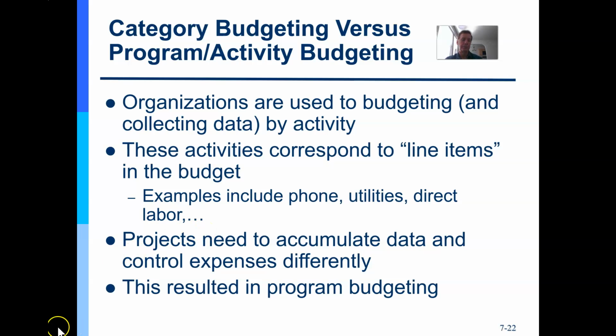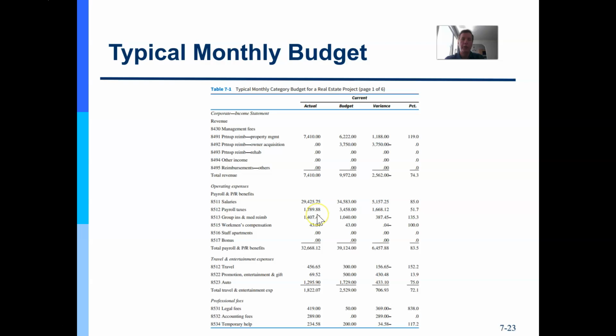Okay, so now one of the things that's going to help you with your budgeting approach is to break out line items. So if you have to eliminate something, you know exactly what it is, or add something in. And a way to organize your line items in the budget is to organize them around categories, right? Categories help us go, okay, what about the interior of the house? That's all the budget we have left. Let's look at that, right? And so you can organize by categories, very useful, right?